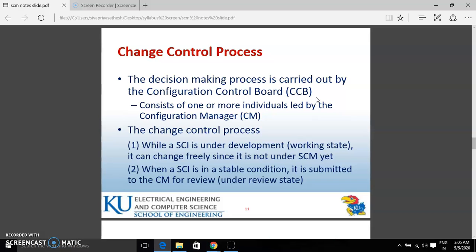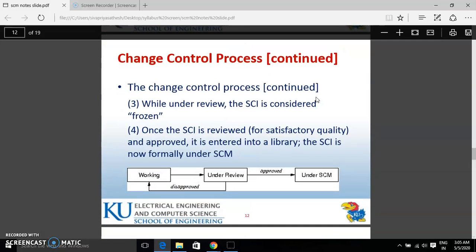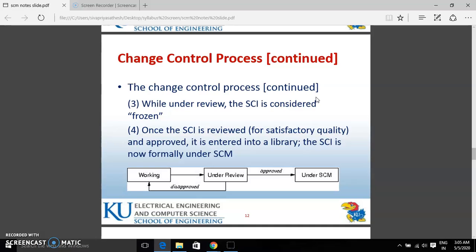In the change control process, the main point is that the change is well motivated. In the first phase, you have to follow only this type of changes. It is not a restriction; your change is well motivated. The second one is that the developer has considered and documented the effect of the change. The developer's decision is very important for the documentation process. The third one is that changes interact well with the changes made by other developers. For example, in your team, your co-worker has some suggestion about changes, so these changes will interact with other changes.